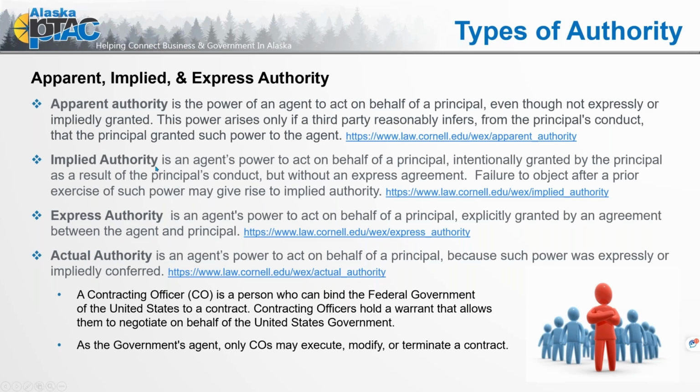and then we have that apparent authority or implied authority, where really it's the behavior. So if we have that general for base coming through and says, no, I want this, or we have a manager or another party not necessarily involved in the day-to-day that starts saying, well, I am so-and-so, I'm in charge of the budget, you guys are spending my money, I decide what I want those changes. Again, they are acting under that apparent or implied authority, but they are not the actual authority. So keep that in mind on who's telling you to do what.